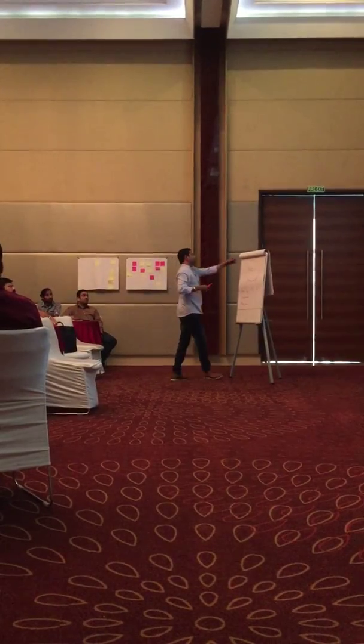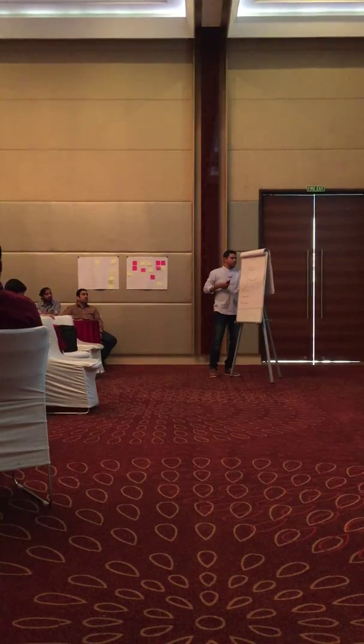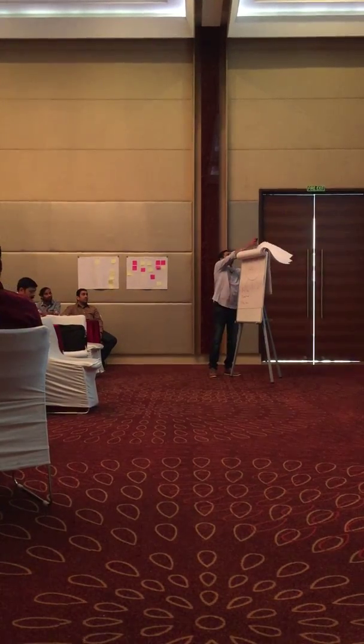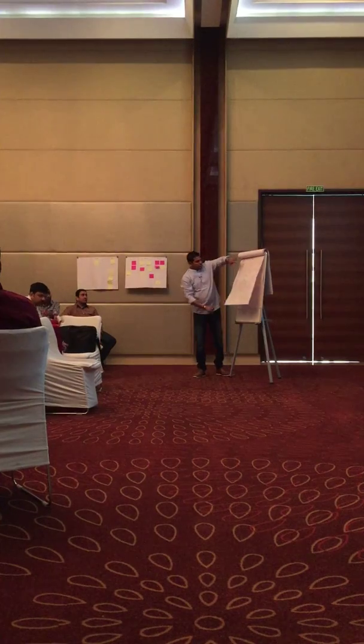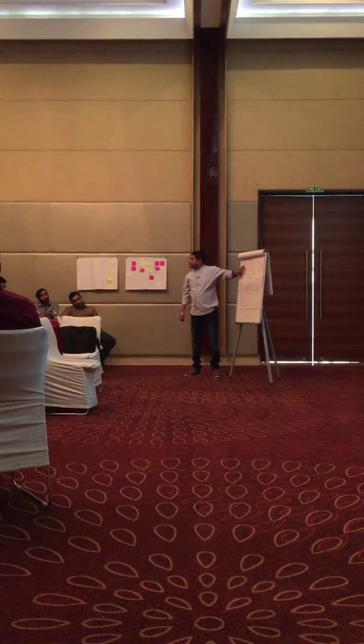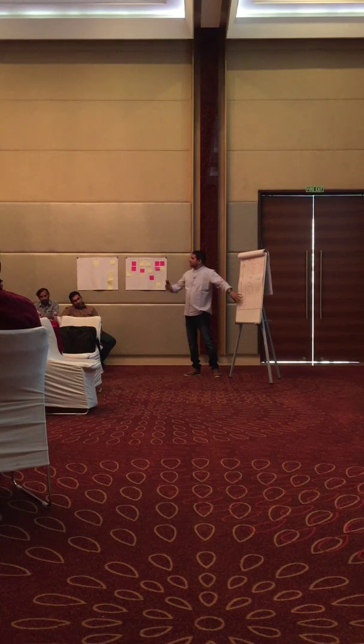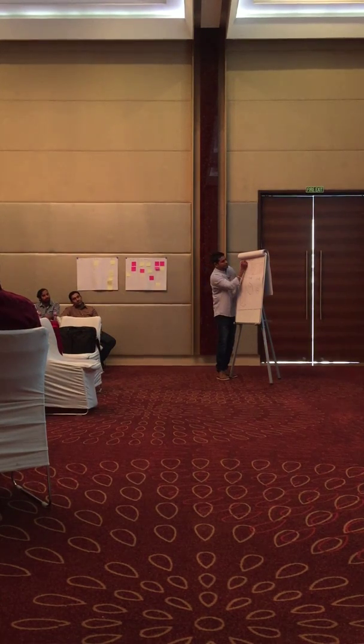Okay, very simple. You have the backlog, right? Assume that this is your backlog. Items will move from here to here, and they get more clarity when they are split into multiple things, right? So items from here, you can mark them as, this is my product backlog. There is a release backlog also. Some of these items may be targeted for release 1, some items for release 2, some items for release 3, like that.